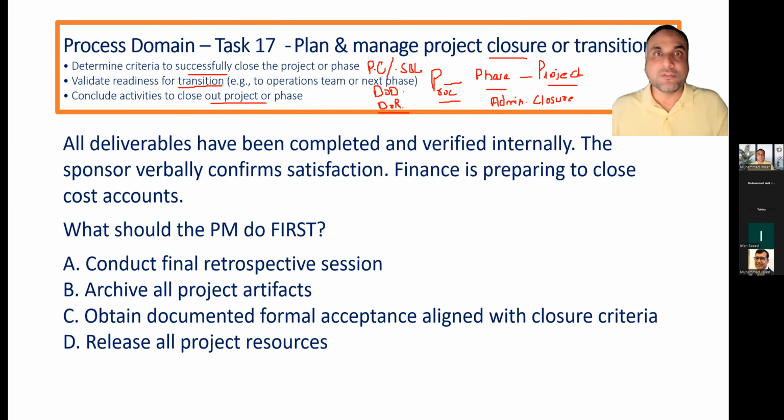After the transition is done and the file is completed, you will check in the final report and mention whether project objectives were achieved or not. Ultimately, collecting all the lessons together, putting them in the project archives, you will release the team and then release yourself. That was the definition of task 17 with the revision of information.